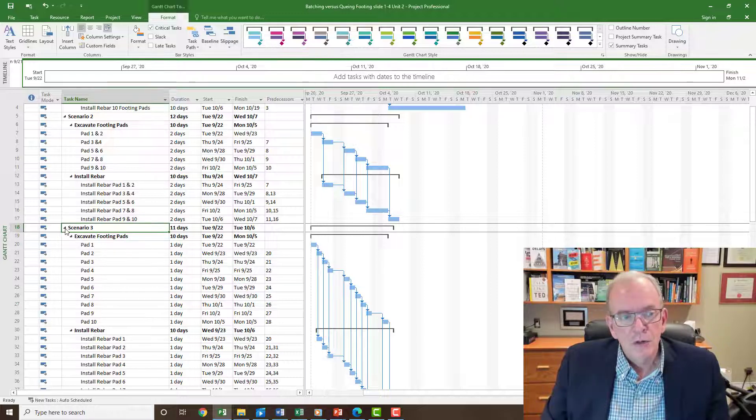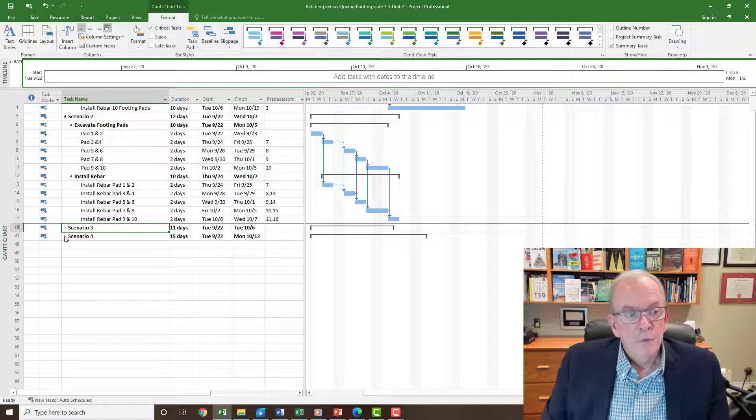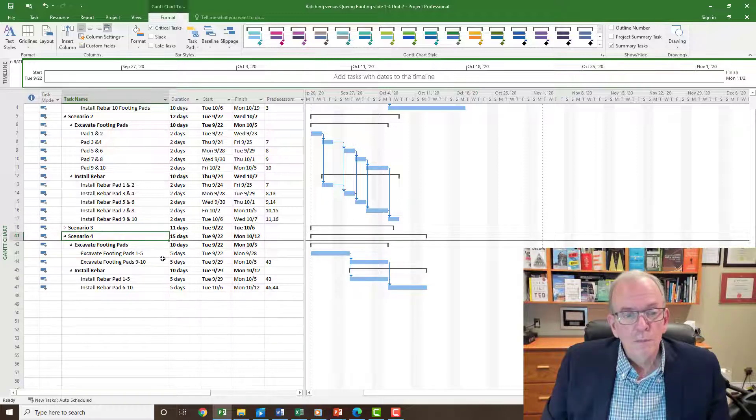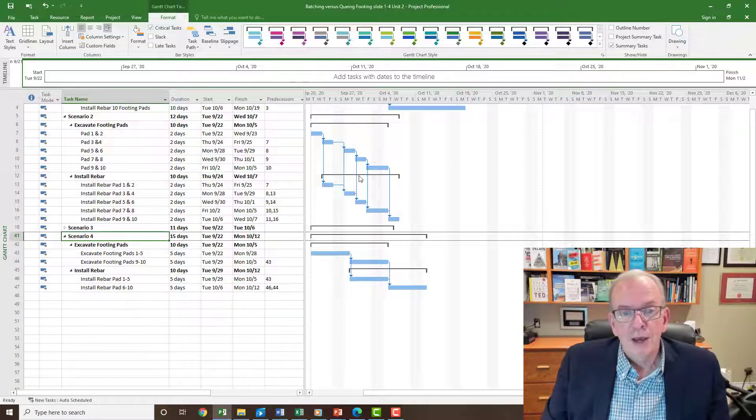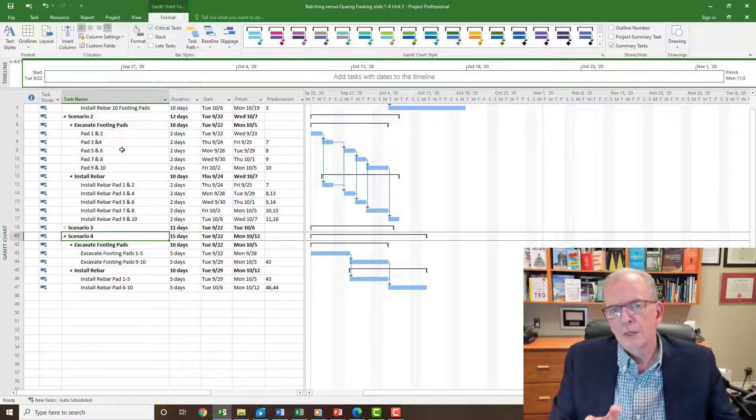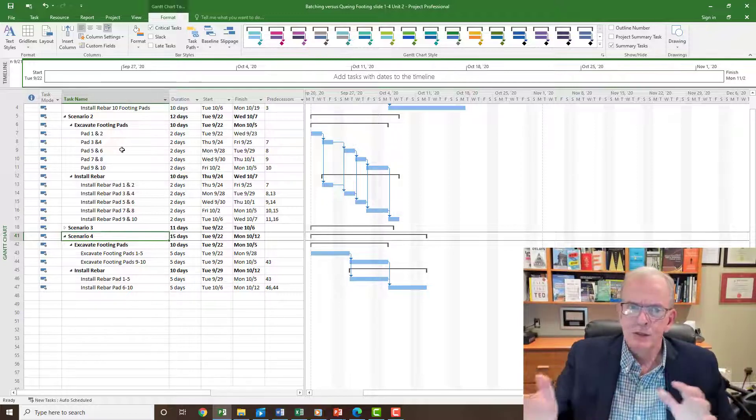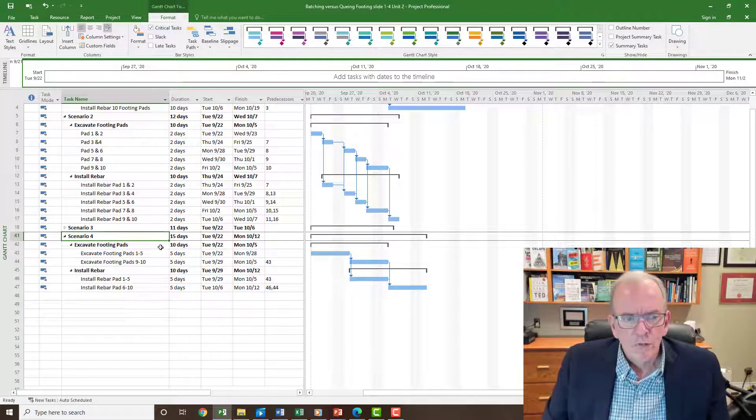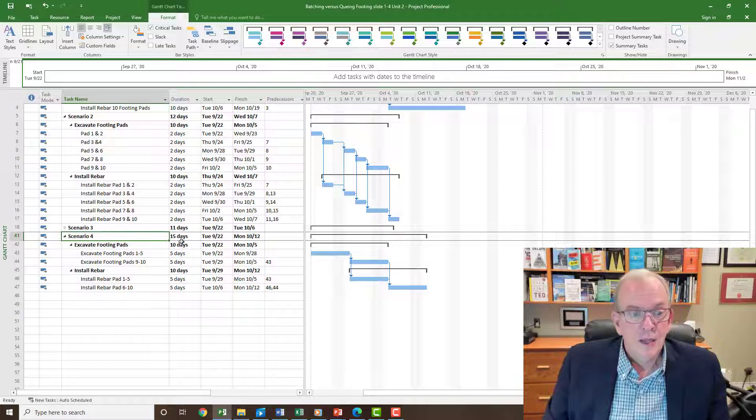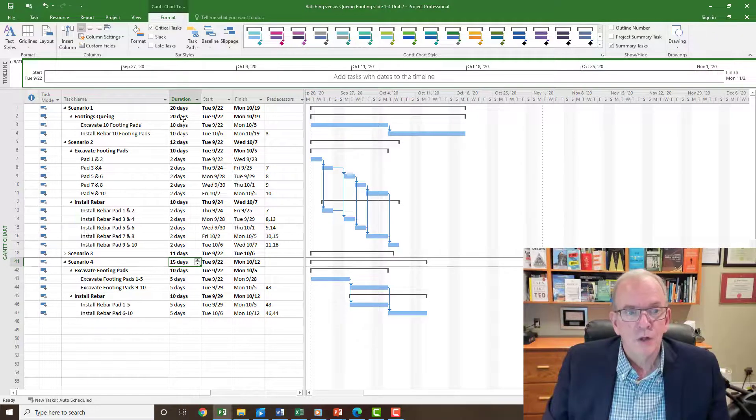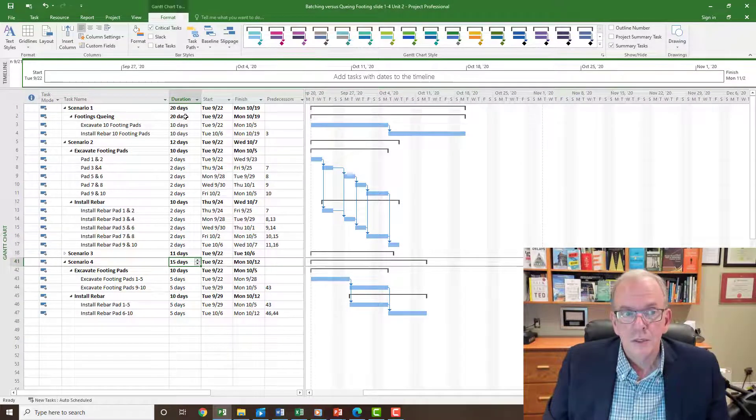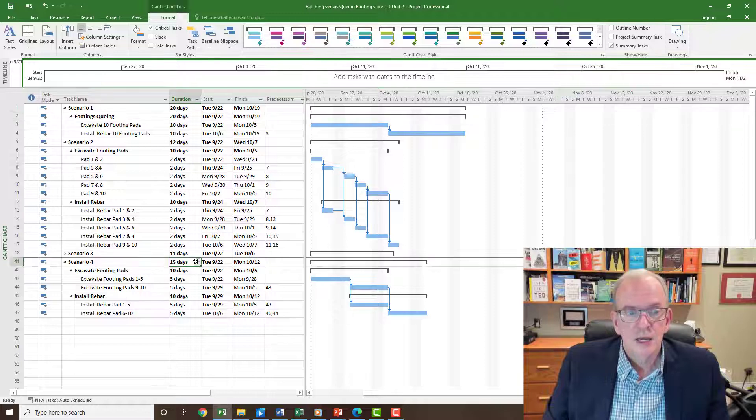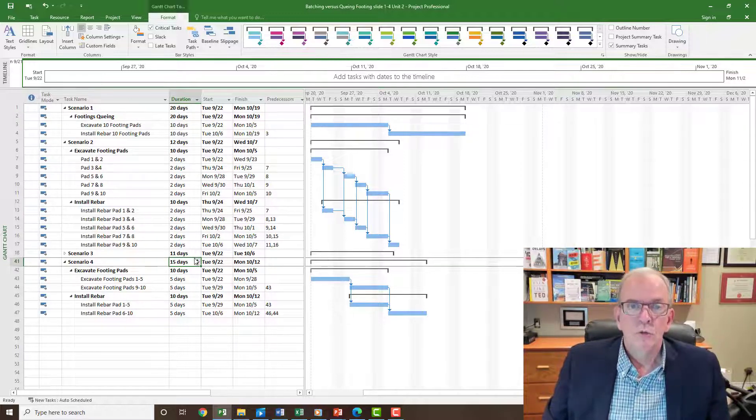So you might wonder, all right, maybe we should think about this. Maybe we should also check maybe another scenario. Scenario four - maybe we decide, oh well what would it be if we did it with five footing pads? Because maybe we decide these two, it's a little bit, because safety comes first, maybe it's a little bit too close. Let's go with five and then we'll have the next five. And that actually cuts it down pretty substantially from scenario one as well, because scenario one was 20 days, this is cutting it down to 15 days.